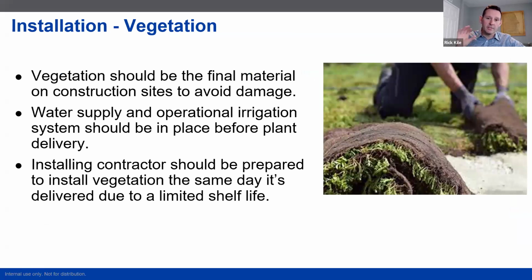And then when it comes to vegetation, we want to make sure we have ample access to water, that the logistics are well coordinated so that when the material shows up on site, it's ready to be installed. We don't want to ship plant material to a project site and have it sit there for 3-4 days and essentially become soggy lettuce.